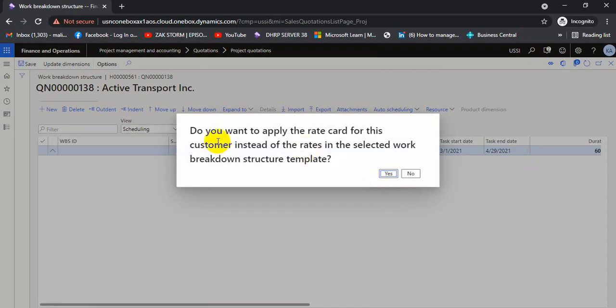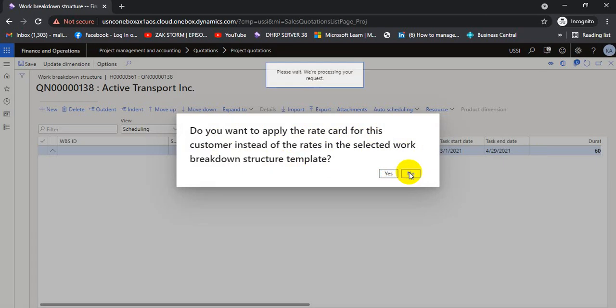There is an option to apply prices from the customer card, or we can use whatever rates are saved in the WBS. The prompt asks: 'Do you want to apply the rate card for this customer instead of the rate in the selected work breakdown structure template?' I select No, because I don't want to use the customer rate — I want to use the WBS rate attached in this template.